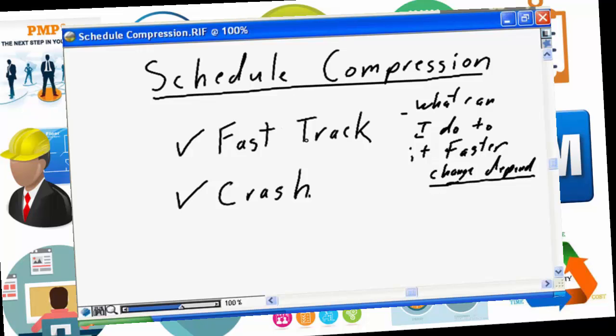Another thing you can look to do to fast track, can you add resources? If you add extra resources to your project and reassign some tasks to the new resources, does that improve the project delivery end date? Instead of having resource number 1 working exclusively on a task, maybe you can add a peer, a buddy to that task, and complete the task faster.